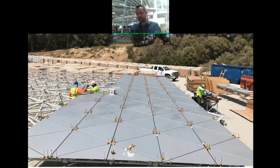But during that time, it follows that order that was established for the installer. So that when this crew in the field opens up a crate, the first panel they see, the first skin they see, is the one they need. So the logistics of that are extremely critical. If you get it wrong, it can make a project like this go far less smoothly, it's a mess.